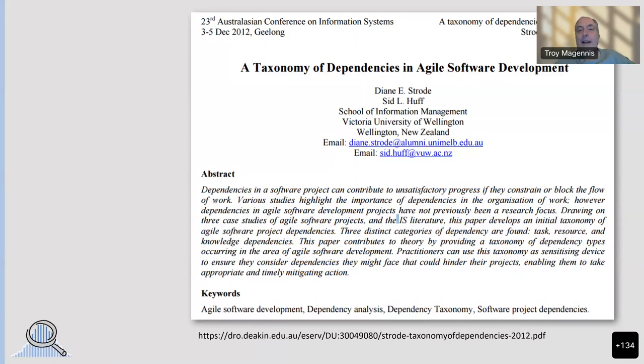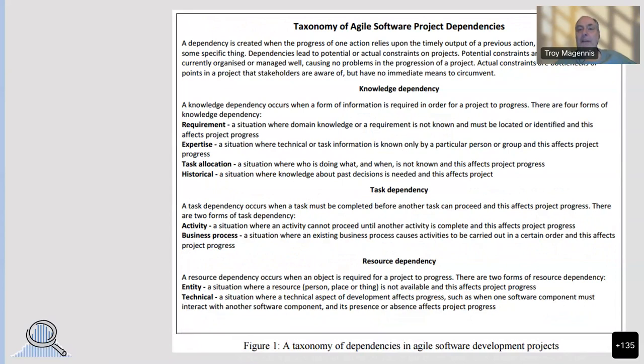I didn't invent this — I took it from Diane Strode and Sid Harp, who wrote a paper in 2012 where they named the types of dependencies hit in agile software development. There's a link to the original PDF in the slides. It comes down to three different types: knowledge dependencies, task dependencies, and resource dependencies — which match roughly what I said earlier about needing something, needing someone, and needing to learn something.